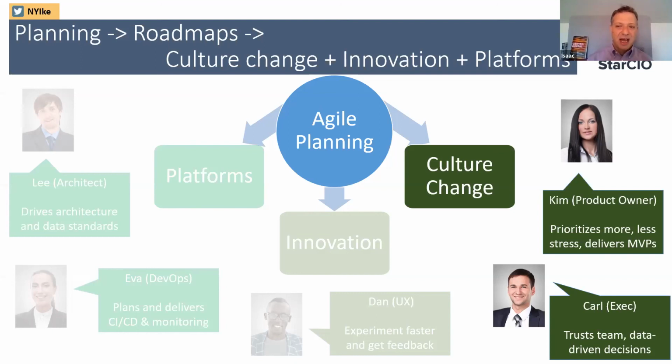And so a lot of what the product owner really has to do is make decisions over what's truly going to give value and when there's commonality of need and whether some investment is actually going to drive impact. So a lot of the feedback in terms of building backlogs up and estimating is a way to give that product owner some tools and knowledge around selecting what to prioritize, but then also what the MVP is.